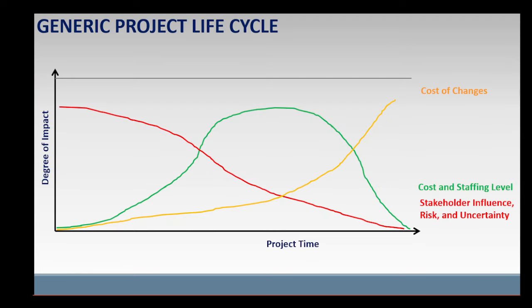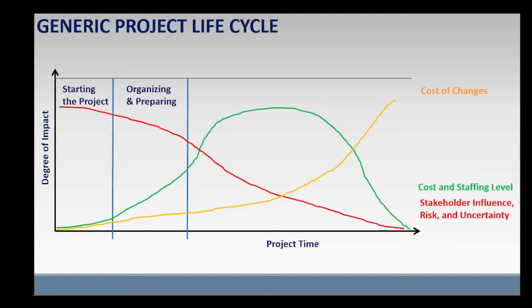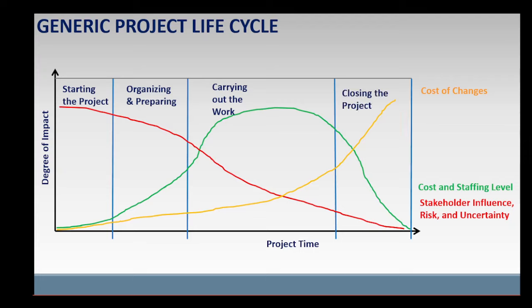Any project life cycle can be mapped to the generic project life cycle, which is divided into four phases: starting the project, organizing and preparing, carrying out the work, and closing the project. A successful project life cycle ends with the creation of a unique deliverable, such as a new product.